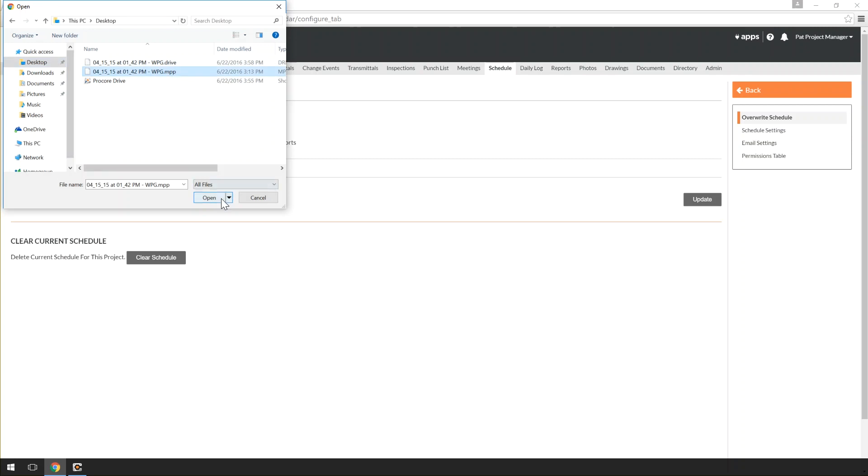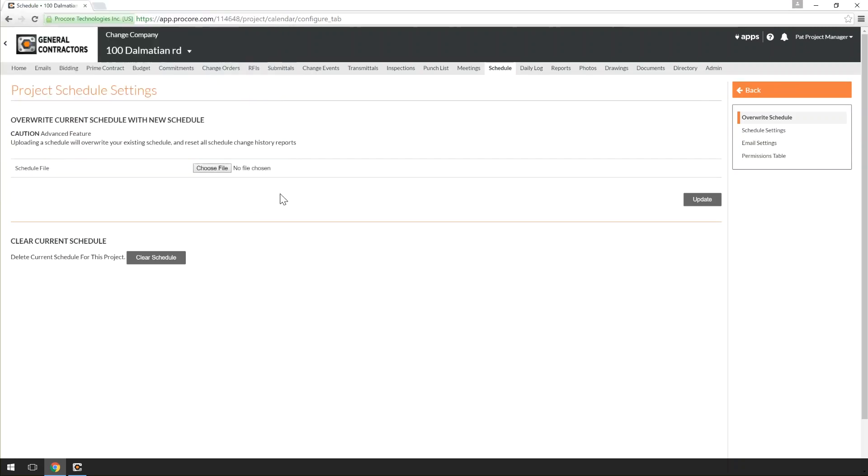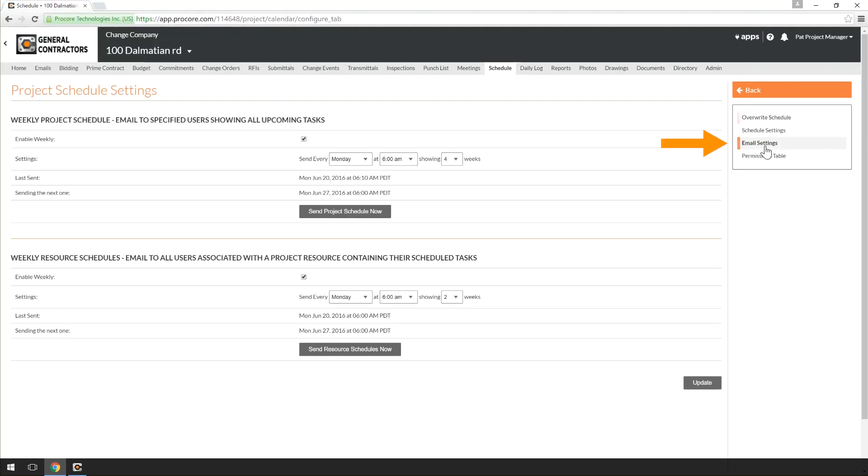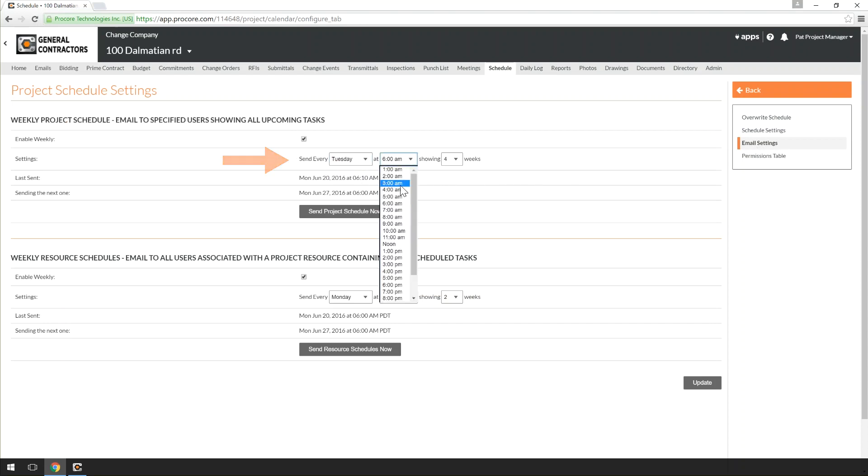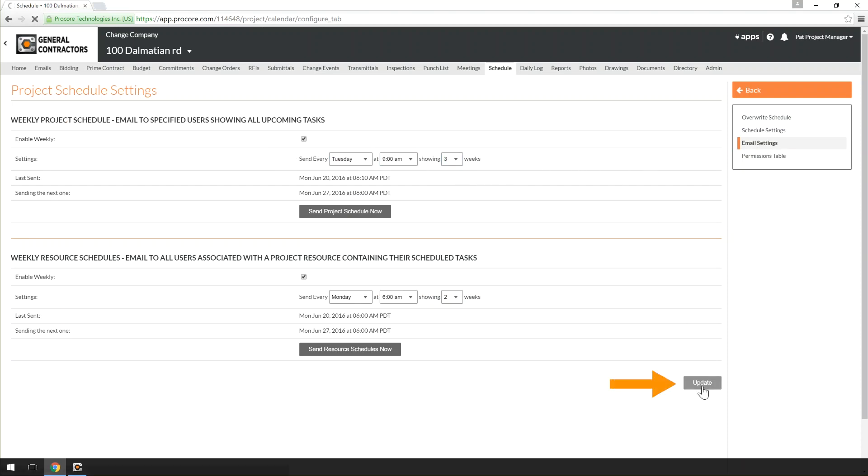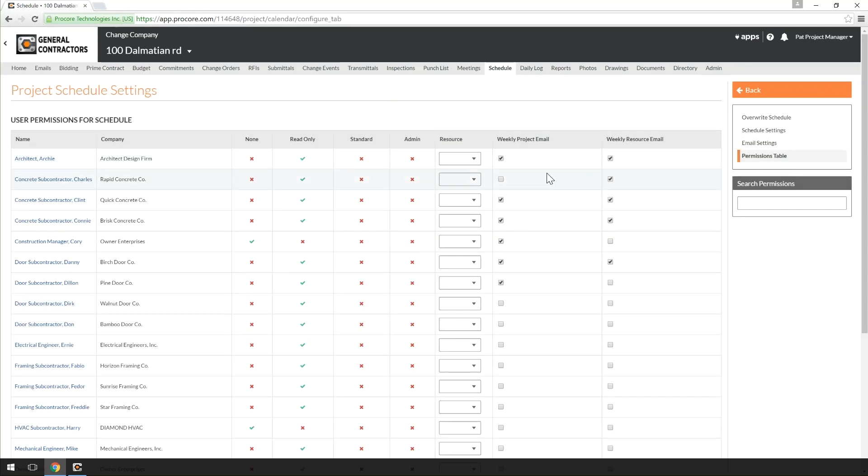If you want to make sure your team is aware of the upcoming week's schedule, click on the Email Settings page. From here, you can either send them all tasks that are assigned to them or send them a weekly digest of upcoming tasks for the entire project. With an integrated schedule, we recommend sending weekly project schedule emails. In the Permissions table, set who will receive the Schedule.